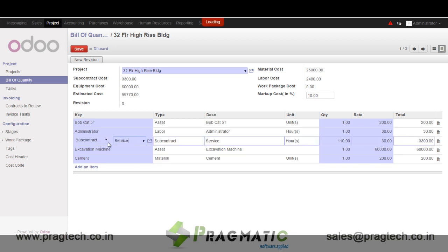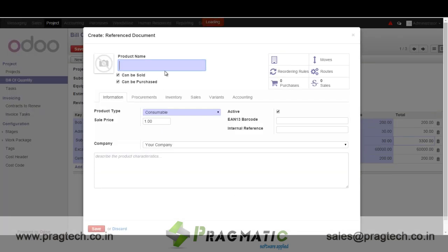Another addition is the service provider. The moment I select a subcontractor, a product type of service gets added, and I select what type of service the service provider will provide. For example, if there is a painter, I can enter the price — say, what price I am going to get the painting job done per square foot — and this automatically gets added to the project cost head.